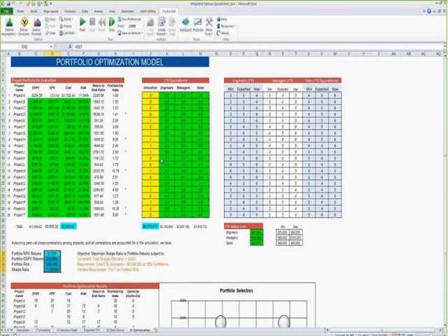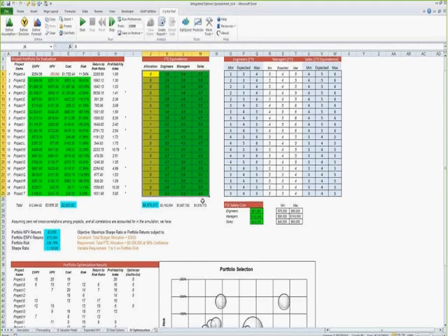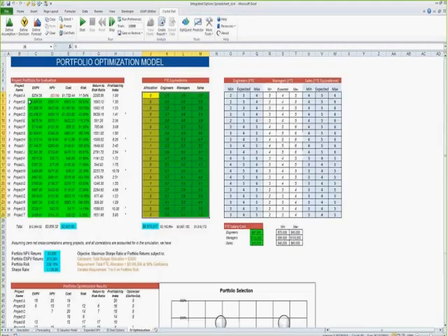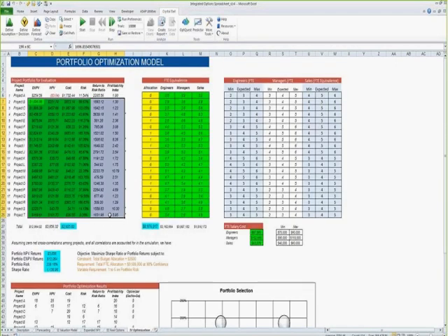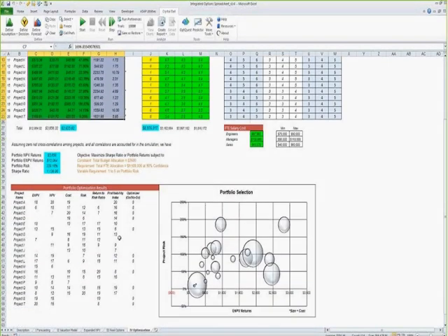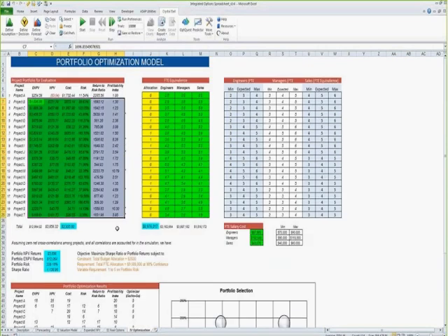Using optimization, because we're not going to run it necessarily right here, it will turn on and turn off both the resources, so how many people, what is the best combination of people, and it will turn on and turn off which projects you should be working on to see what will give you the highest return. So that's how you would combine using Crystal Ball and Primavera PRA to get a very complete view of both your financial and your project management risk.